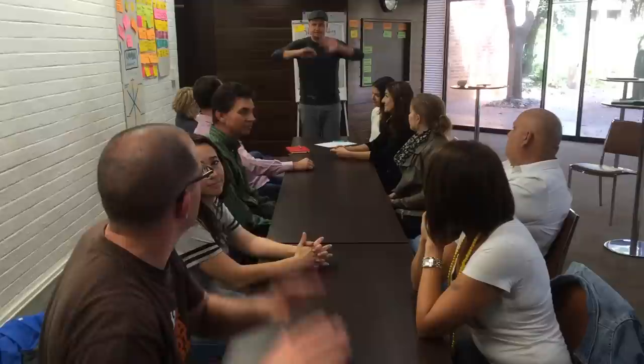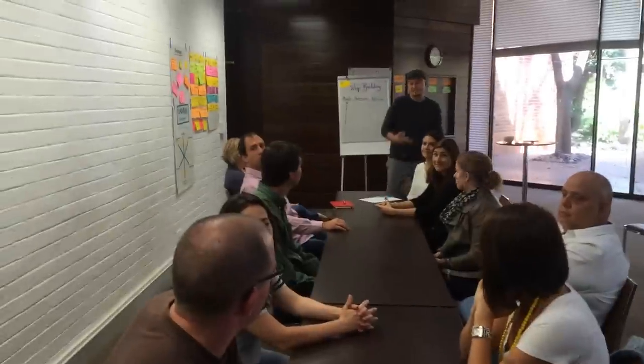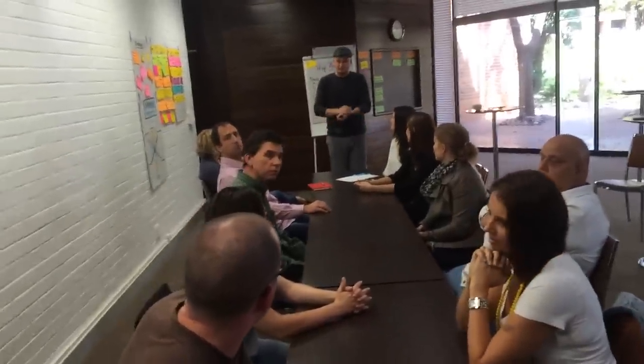Just pull. Working area, step. I don't raise my hand because... Yes, it applies to you too, because if nobody pulls the work, you must have your hands up to say you've done your bit. You do your step, and then you don't push it, just get your hands in the air. Only for the last step, there are no hands in the air. You push it out of the system. There is no pull going on here, because you are the last step.